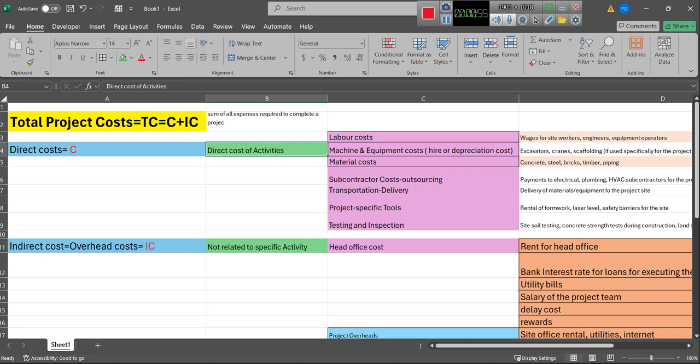When you go to Microsoft Project or Primavera, you have some resources. In Microsoft Project, you go to the resource sheet and state the labor cost. So you have one electrician, you pay $40 per hour, and overtime is that price.